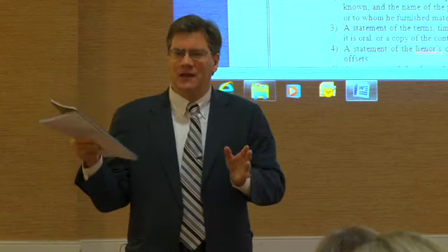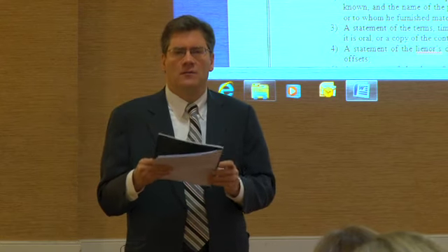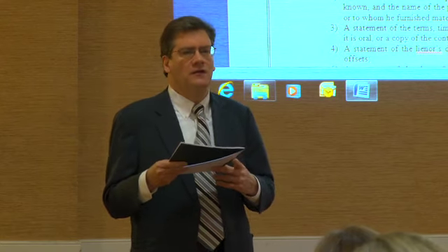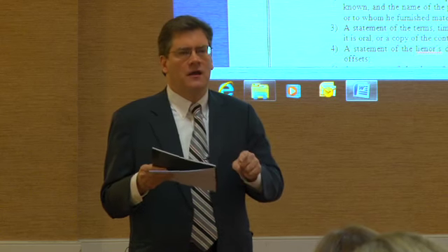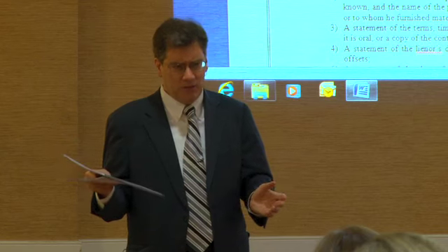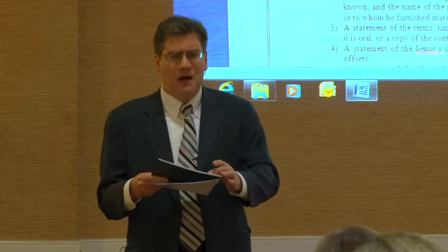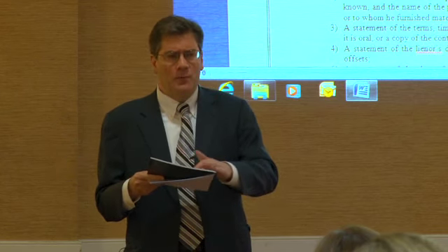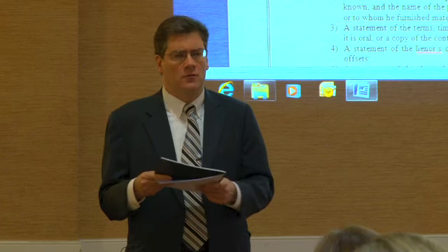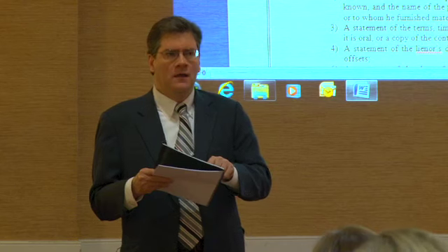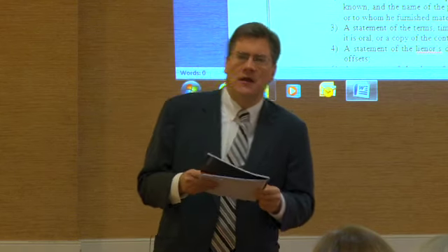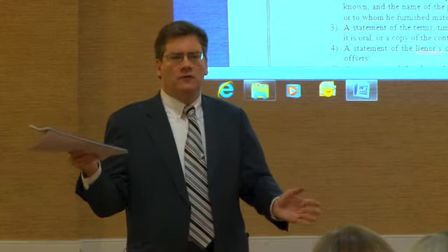So I do what's called an idiot test before a document goes out of the office, and that test goes like this: what kinds of things, if I make a mistake on them, make me look like a complete idiot? It's as simple as that. Are the party names correct? Is our customer correct? But here's the biggest one: is the county correct? You know, Prescott is up in Yavapai County, and everybody uses forms.